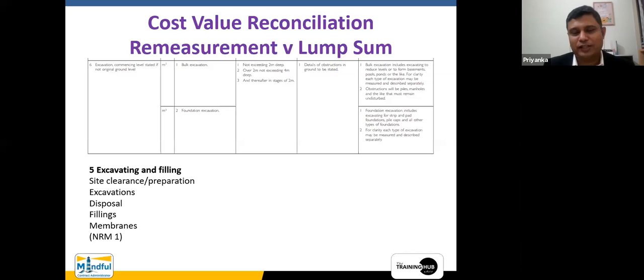In order to identify that, you do a similar work study. You ask from the nearest site, another site, or you check the norms, right? And then you find out that the estimator has made a small mistake. Instead of 2 machine hours, he has put 1.5 machine hours to do 1 meter deep of excavation. So because of that, the estimation is wrong. So you can give advice based on your work study that, Mr. Estimator, your estimation is wrong for future tenders, because for this tender you cannot make that change. For future tenders, please alter that from 1.5 hours to 2 hours. So that is the advice that you can give based on a work study.